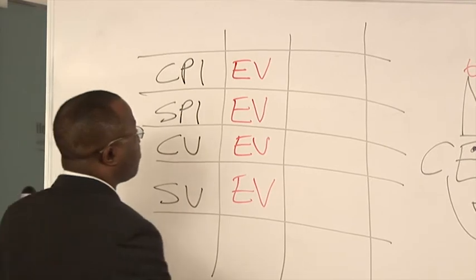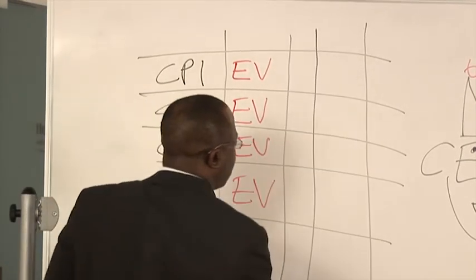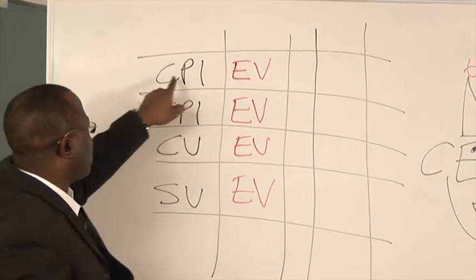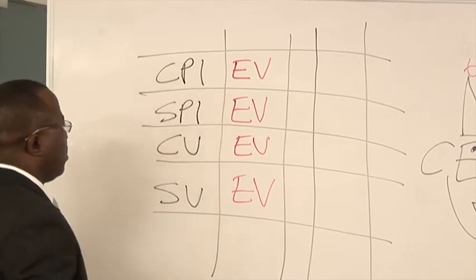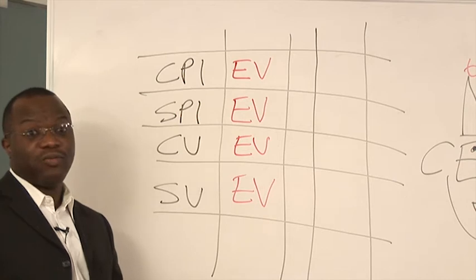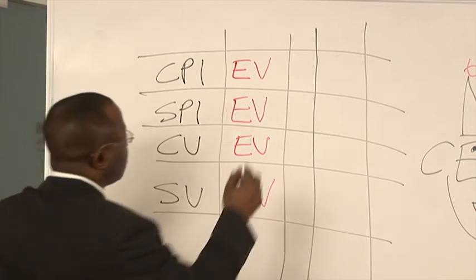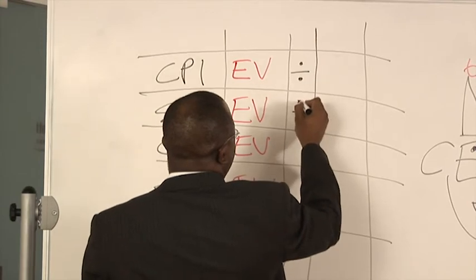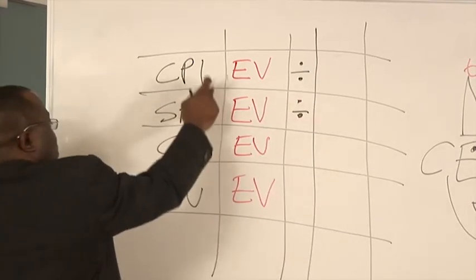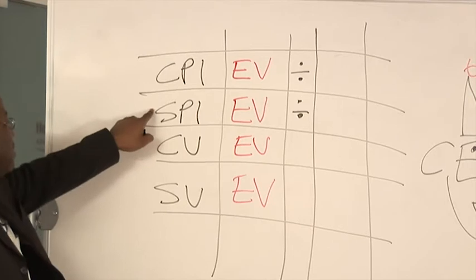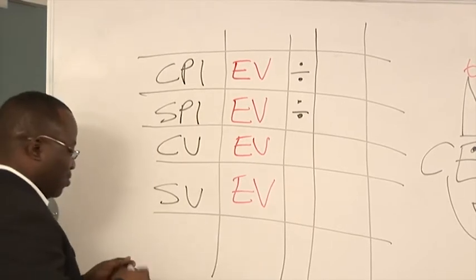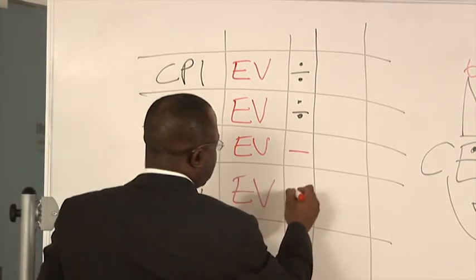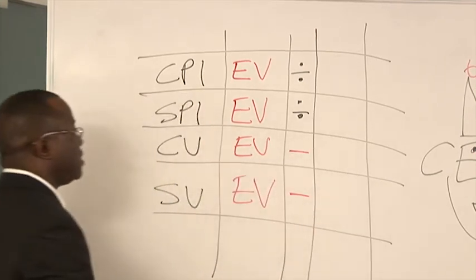You also need to remember basic math. If we're talking about an index, cost performance index. If we're talking about an index, what do we do? We divide. So we're gonna put divide here and divide here. Because this is an index, cost performance index. If we're talking about a variance, what do we do? We subtract. Variance subtracts. That's easy.